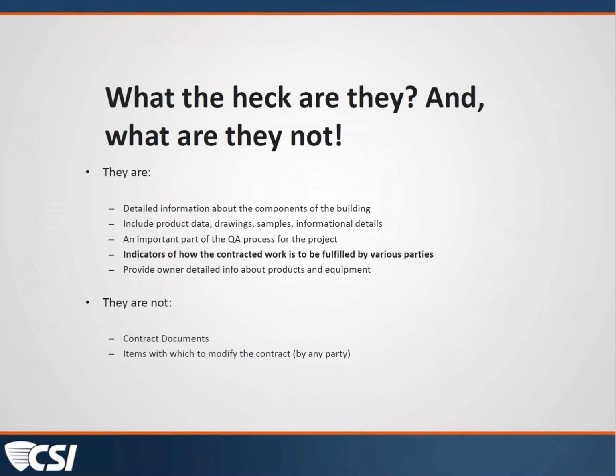Yeah, it seems like we have some additional questions regarding, I guess, the clarification of all the different drawing sets and when they're done, what they're called, and who's in charge of them. Robert here chimed in saying that they use the conformed set title for documents that include all addenda and comments from the AHJ, and those are indicated as the before construction drawing set. At the same time, David Scott is saying that record drawings are what we give owners. As-built is what the contractor gives architects.